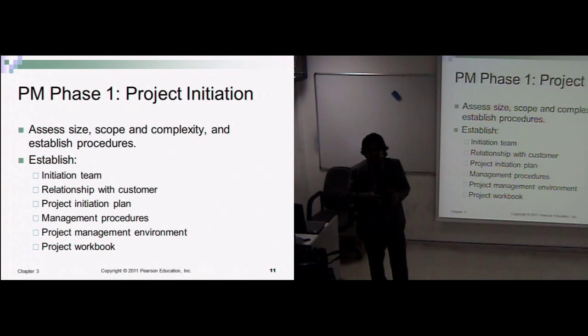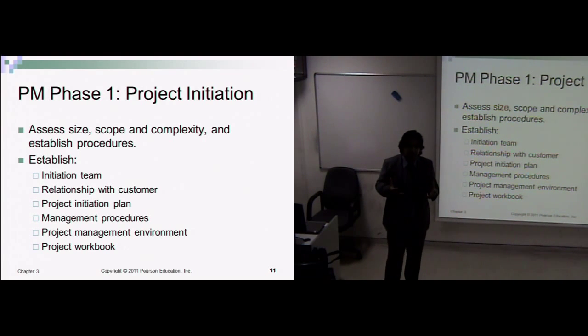This will increase the scope of the project, and ultimately increasing the scope will increase the size of the project as well. More scope would force the development team to include more expertise and more skills, which increases the size of the project.